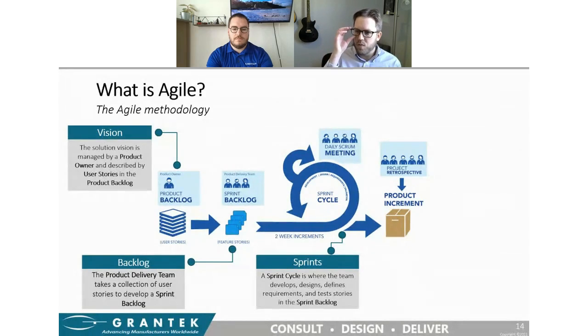Unlike waterfall methods, where you're going to sequentially complete requirements definition, then development, then testing, so on and so on, in Agile, you're designing and developing and testing with the intent of delivering a working feature within that time-bound 2-week sprint. So all of those activities happen together.